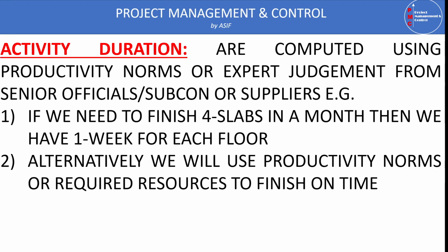So if you have to finish the structure in 1 month, then obviously you have to finish each floor in 1 week. So you have to divide your activities in such a way that you can finish each floor in 1 week. To finish one floor in 1 week, we need more resources as per requirement. So here you can see that we have a time constraint, not a resource constraint.